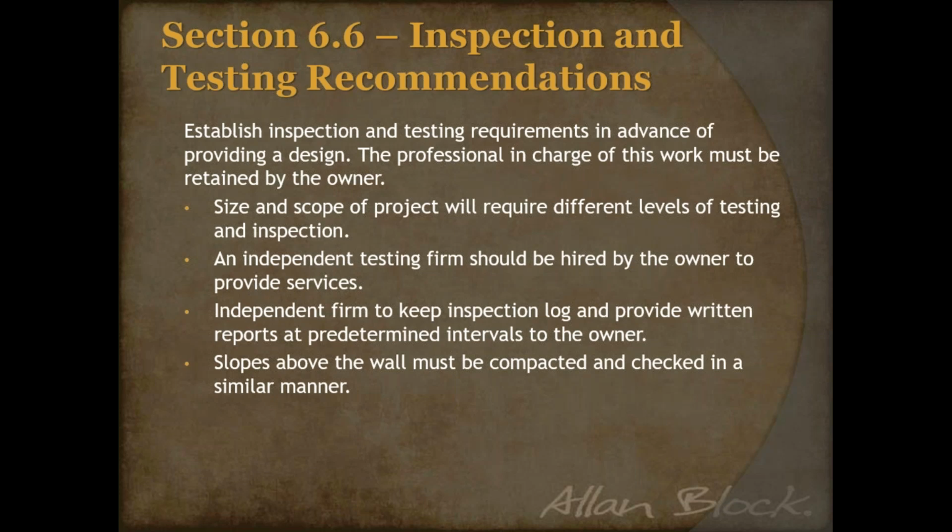The engineers design, owners obviously are the end-all be-all, but contractors should just have to construct that wall. And so we like to try to have the independent testing hired by the owner and being part of that. And then obviously they document what's being done, keep the logs, and help the owner make that determination whether it's done properly or not.